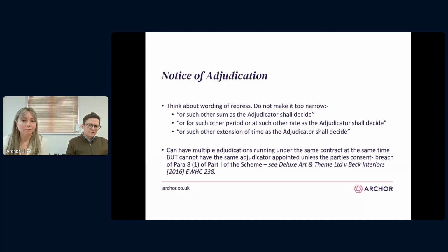On the screen, there are a few examples of what I would call the catch-all wording. The classic example is if you have a true value adjudication, you want to say to the adjudicator, we want a declaration that the valuation of these works is X or other such sum that you might decide. The issue with not including the catch-all wording is that you're only giving the adjudicator two choices, and that's nothing or the sum that you're asking for.